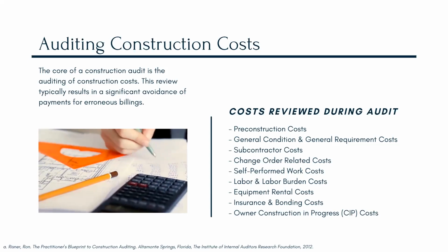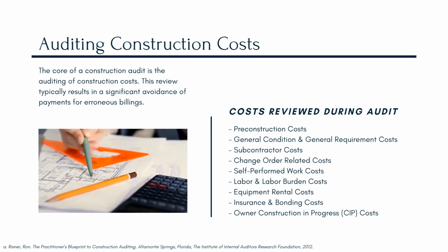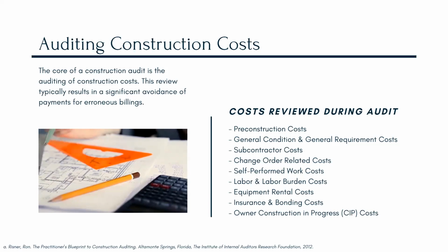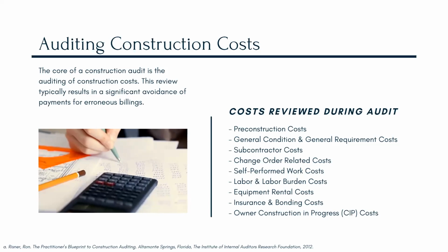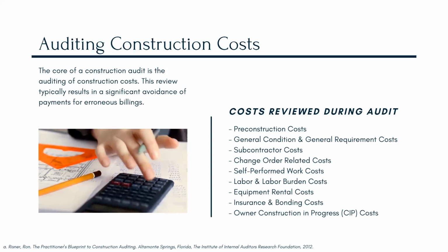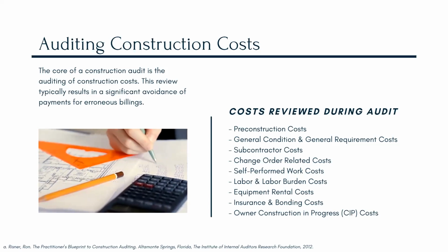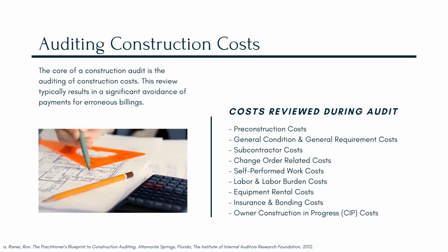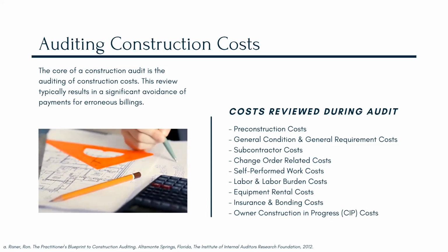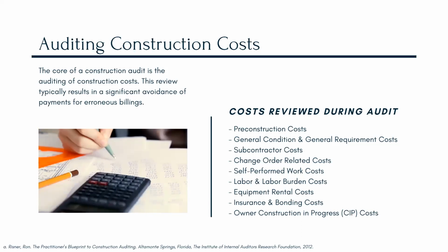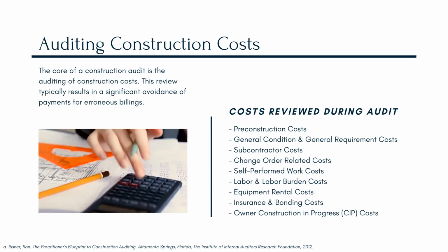Sometimes contracts are clear on contractor owned equipment, on whether or not those billings are included in the fee. Oftentimes that's part of the overhead fee, the markup fee, that is overhead. And if those equipment costs get somehow included in change orders or the pay application, the reimbursable costs, that would lead to a situation of double billing for that item.